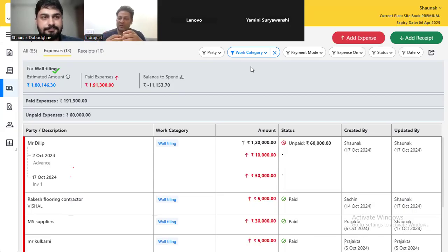Right. So whatever decisions would be made during the progress of the project, you have to identify those finishing items which are controlled by the client. Sometimes the decisions are kept open, like when you are finalizing the quote for vitrified tile or flooring work. If you are mentioning Italian marble flooring, and in your estimate you have considered 350 rupees per square feet of Italian marble, you have to be very clear about it.